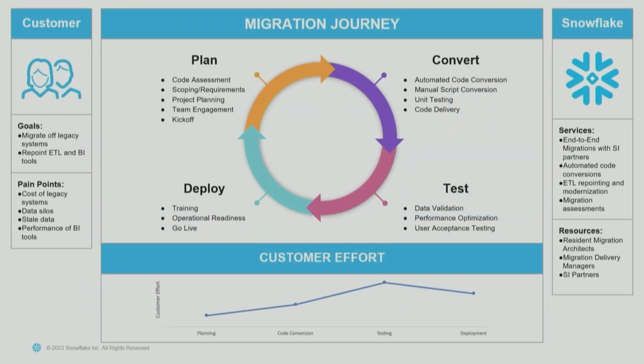Let's get into the migration journey. Right? Here is the high-level overview of your migration journey. You'll start with planning, then you will go into the conversion stage, and then you will test and deploy. What I want you to focus on is the customer effort. During the testing phase of the project, you will have the most customer effort. And this is where resource strategy is crucial. Right? Make sure you allocate the right number of resources at the right stage of the project.